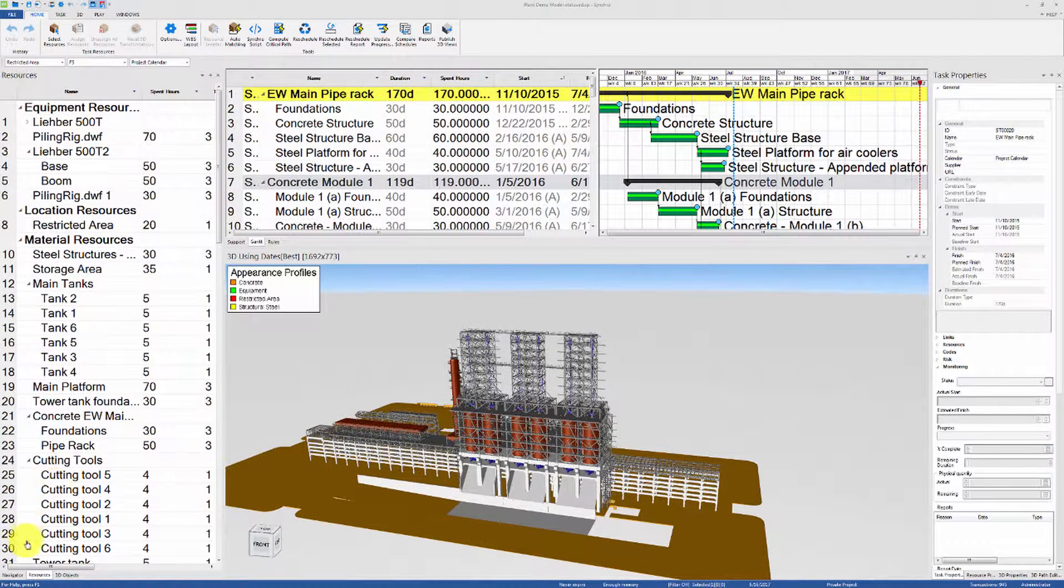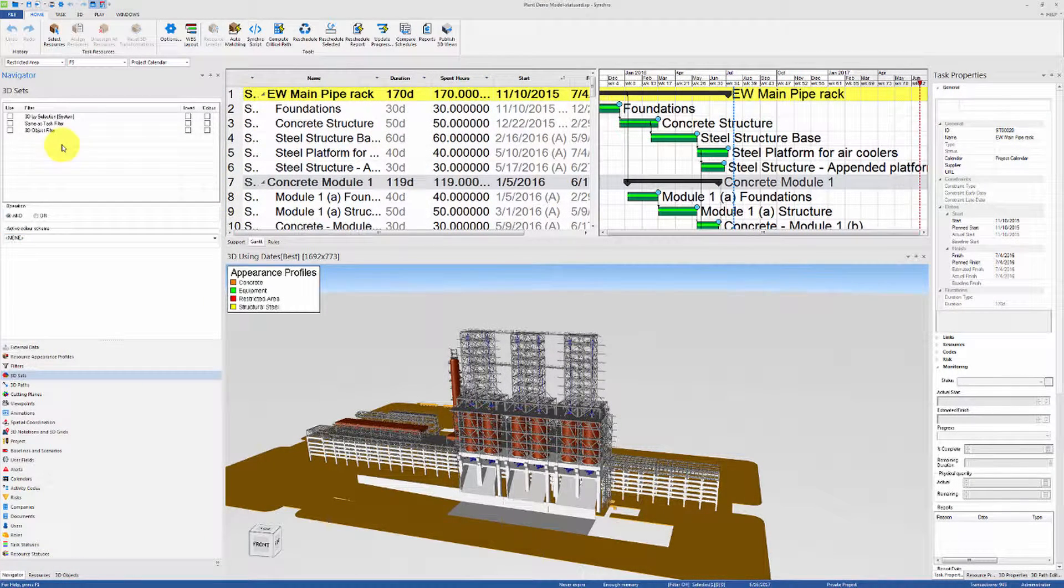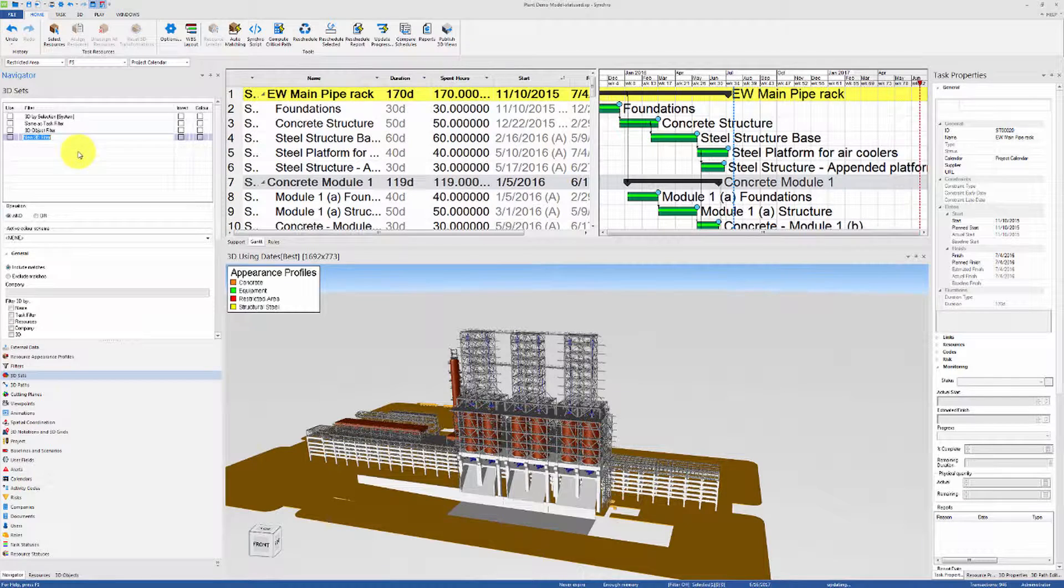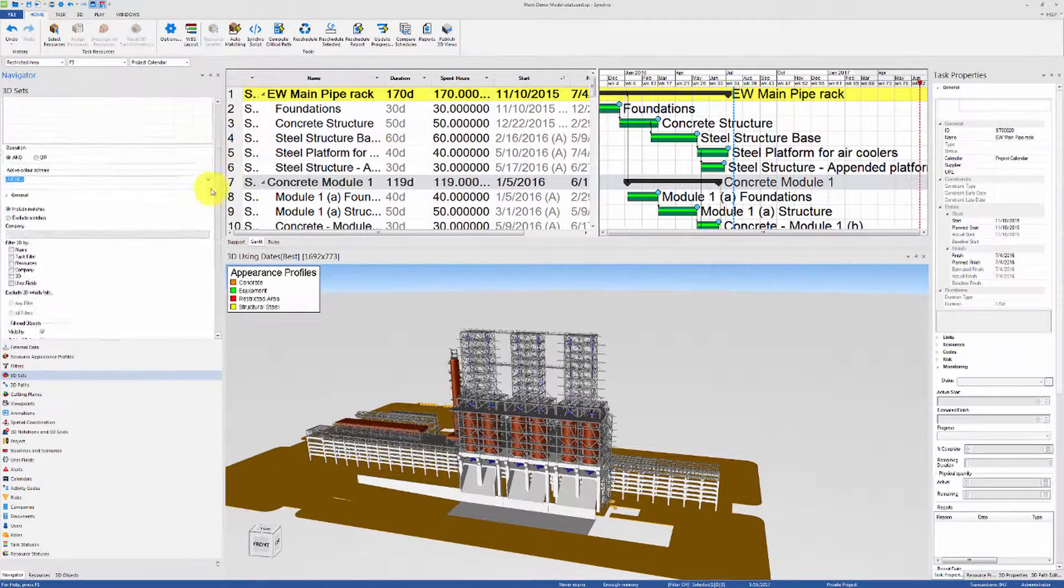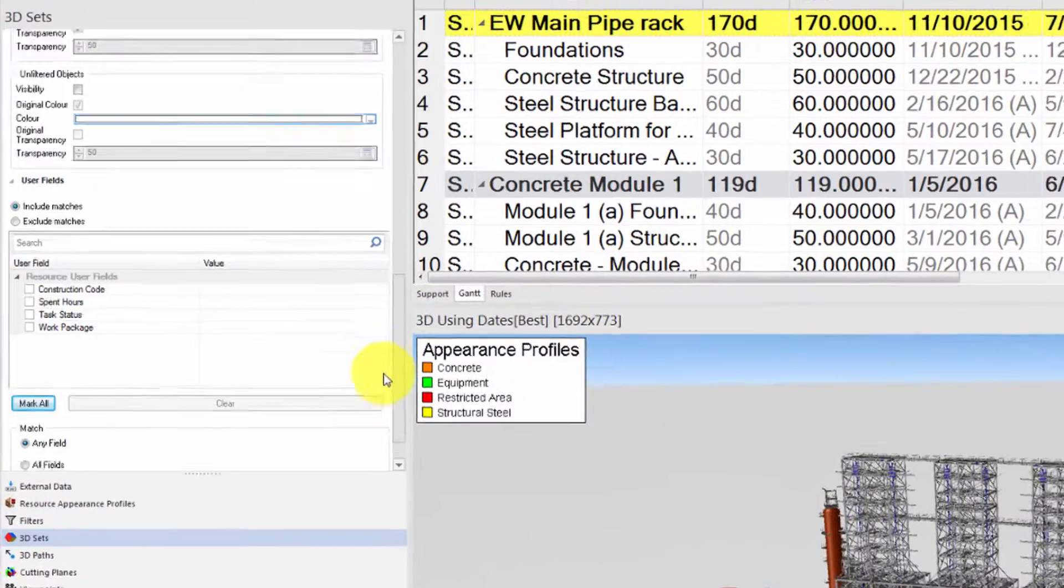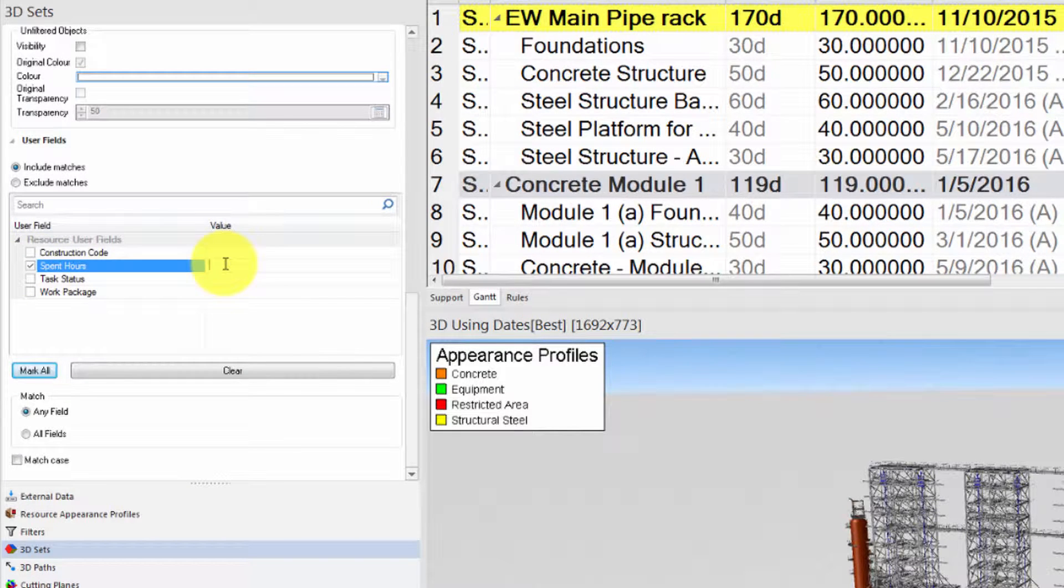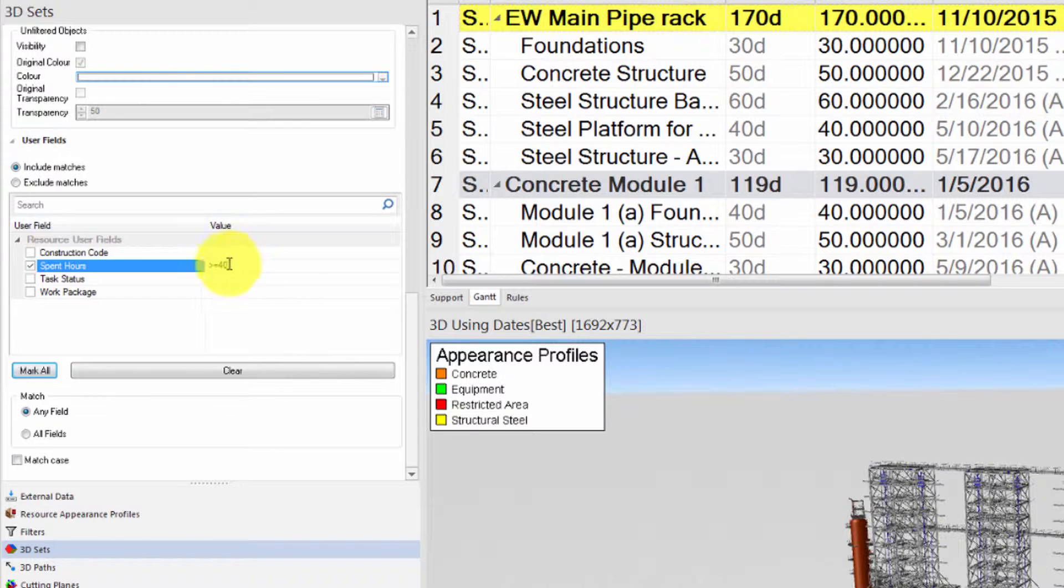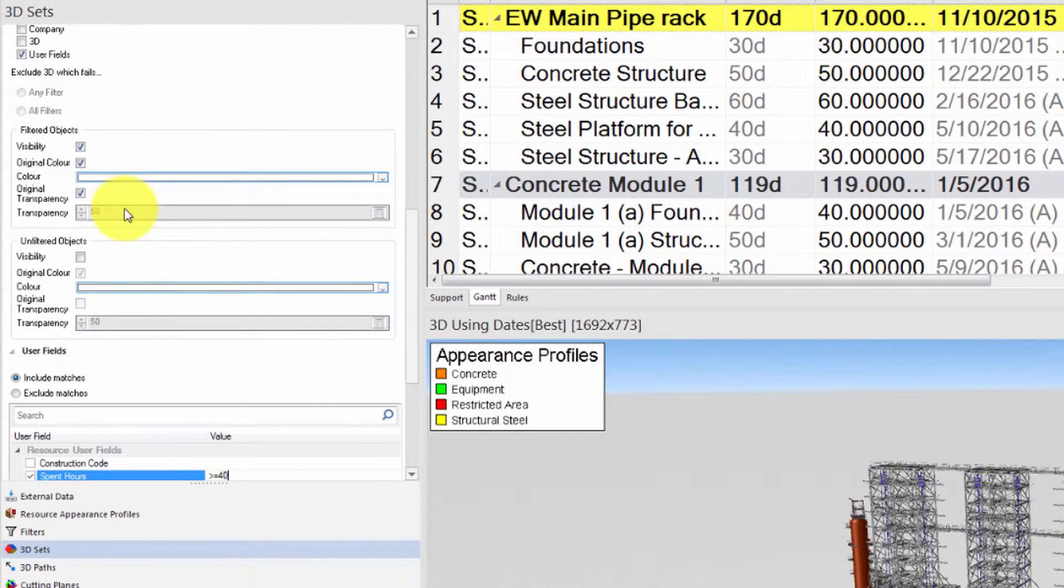We can also use a custom 3D set to visualize where most of the work is being spent. So let's add a custom 3D set, call it custom filter, then let's set it to filter 3D objects by user fields. And then in the user fields section, let's check the box next to spent hours and type in greater than or equal to 40.